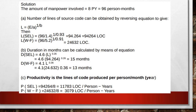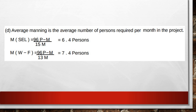The last question is average manning — the average number of persons required per month. Manning = effort ÷ duration. For SEL: 96 ÷ 15 = 6.4 persons required per month. For Watson-Felix: 96 ÷ 13 ≈ 7.4 persons required per month, since the duration is 13 months.